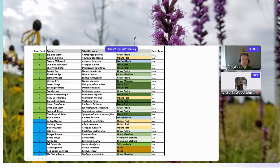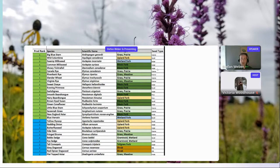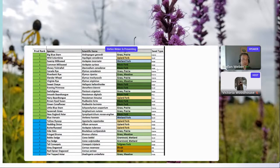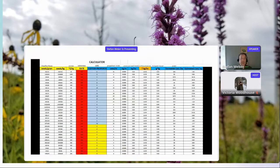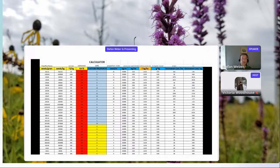Seed type describes the size of the seed but also whether it has extra-floral appendages — coarse or fluffy seeds may have extra bits in addition to the live seed itself. The calculator has a background information section and the actual number-crunching calculator section in the same spreadsheet. There are only two columns you really need to input: the total rate in seeds per meter and your custom proportion — what percentage of each species you'd like in that assemblage.